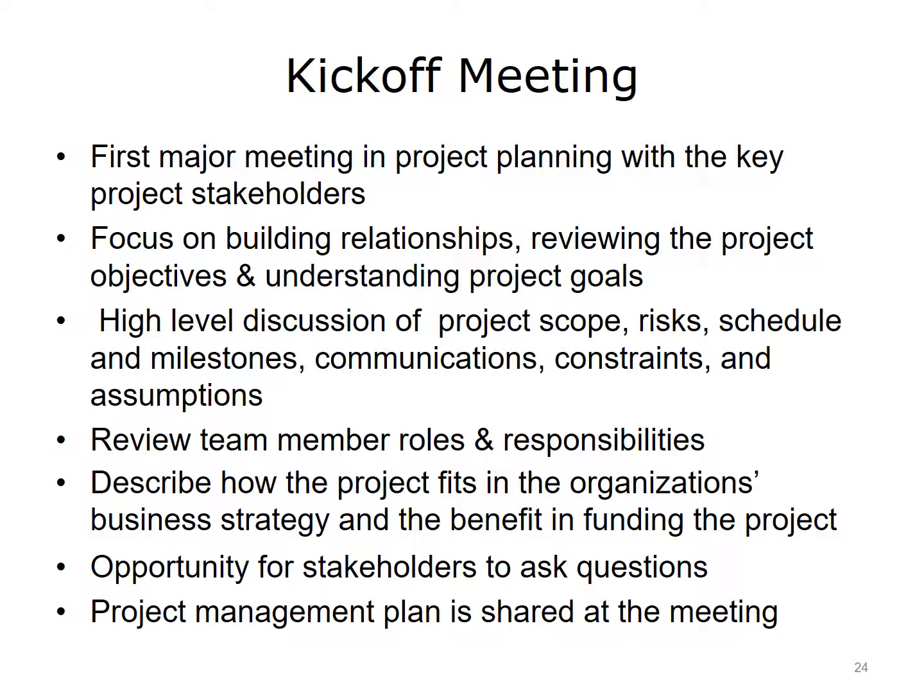The kickoff meeting is the first major meeting with the key project stakeholders. Its focus is on building relationships, reviewing the project objectives, and understanding project goals. It will include a high-level discussion of project scope, risks, schedule and milestones, communications, constraints, and assumptions. It is also a great chance to review team member roles and responsibilities. It allows the project leadership to describe how the project fits into the organization's business strategy and the benefit in funding the project. It is also an opportunity for stakeholders to ask questions. Typically, the project management plan is shared during this meeting.